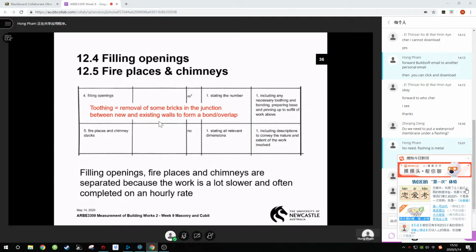Projections, on slide number 37 we are now. Projections are things that stay, like plinths and friezes. String courses can be projecting or recessed, and corbels. They're not things that we often come across, but I've got a few here on slide 38. Here's some projections. We've got a base plinth, where the plinth was always at the bottom of a wall. You've got a string course. String courses don't usually stick out that far. They usually stick out only 20 mil. And you can see those.